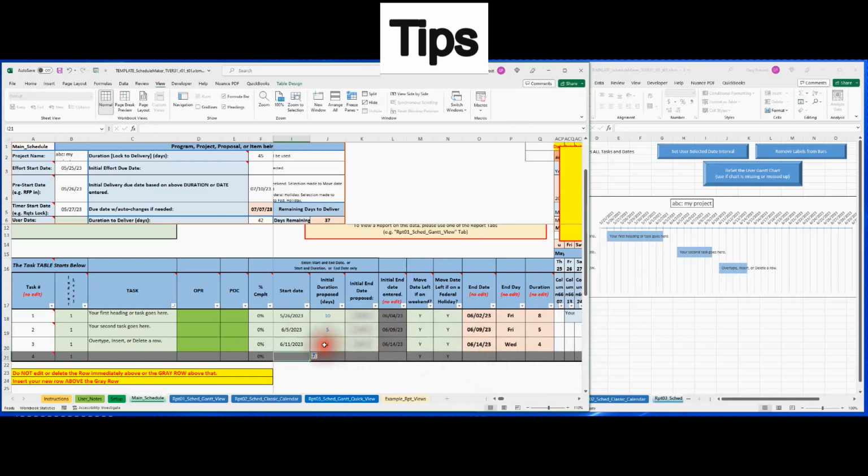of 4 days. So what's going to happen here is you could change the start date and everything will ripple through. So I'm going to change this to 28, and you notice on the right everything shifts to the right. Now if something should happen to fall on a weekend, I'll do this by one more day and we'll see what happens.